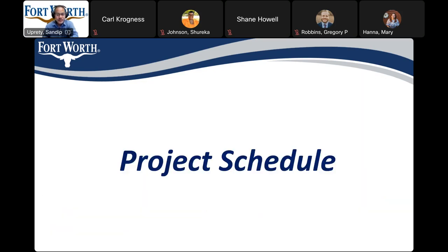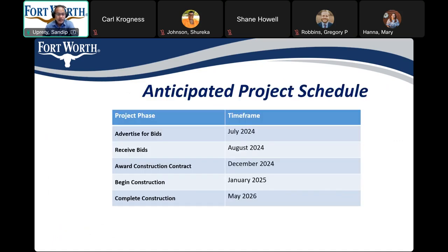We'll be moving on to the project schedule and upcoming milestones. The anticipated construction start date is January 2025, and construction is anticipated to be complete in May 2026. We will also be having a pre-construction public meeting to give detailed information before construction starts and what to expect. Similar to this meeting, you will receive mailer cards with the assigned date for the pre-construction meeting.